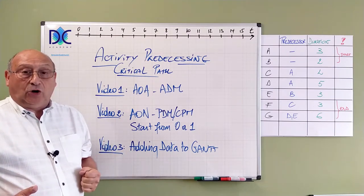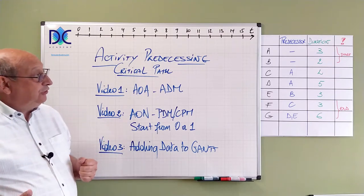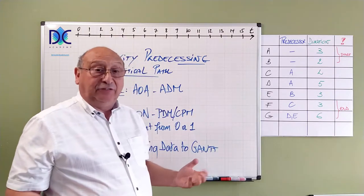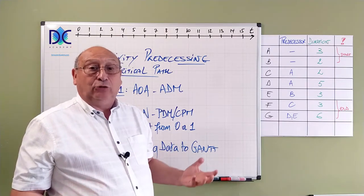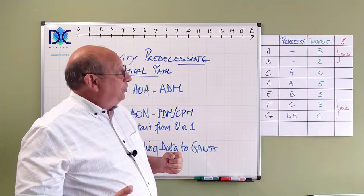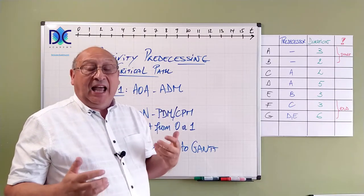We're starting with video one here. Here I'm going to draw the network diagram where I have here the activities from A to G with their predecessors and their duration. What is important to consider here is that activities A and B have no predecessor.